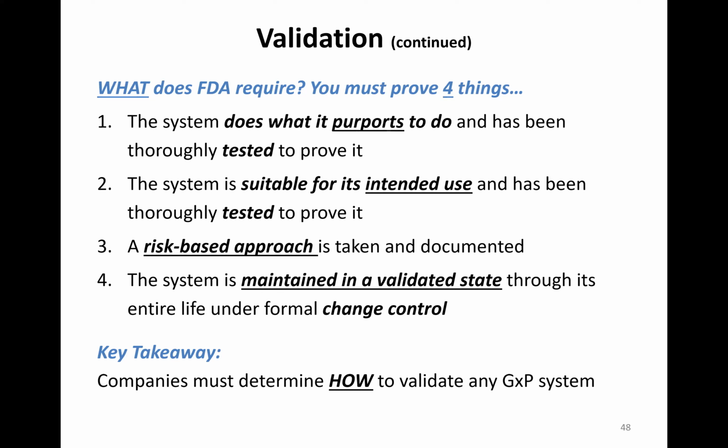Now, risk is something that some people can take to an extreme. You want to be wary of that. You want to be careful so that you're doing due diligence, but you've got to realize this is a very subjective type of opinion. Everybody perceives risk differently, and don't get stuck in the mud where people are arguing about whether a risk rating should be a 7 or an 8 or a 3 or 4. So I generally use high, medium, low, a qualified scale, because people can see the difference between high and medium and low, and you can gain consensus. If you get into numbers, a lot of times those meetings will drag on and drag on. And I had one case where it went 6 weeks before everybody could agree on what risk rating should be assigned.